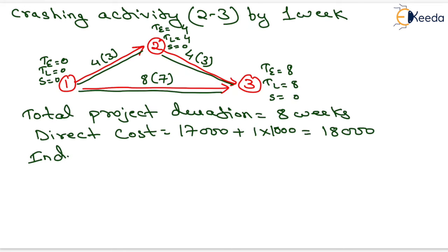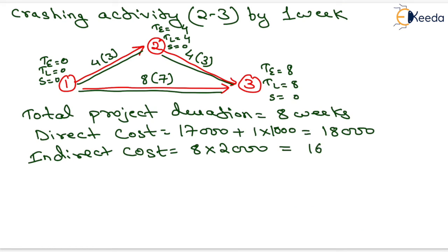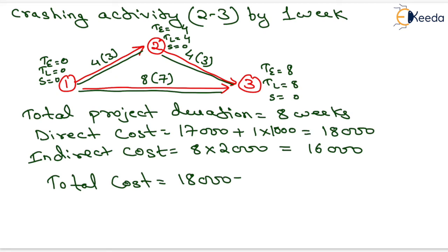Indirect cost equals 8 weeks multiplied by 2000 rupees per week, giving 16,000 rupees. Total cost equals 18,000 plus 16,000, which is 34,000 rupees.